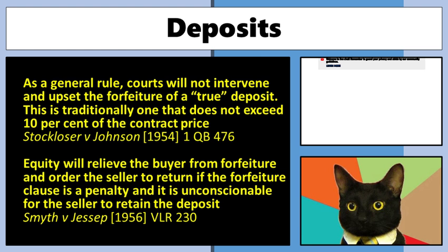And we want to go through and look at what the parties, objectively speaking, agreed to at the time. And said that, look, when I enter this contract, this needs to be done by this time, and if it's not, this amount becomes payable. If the two parties are coming to this on an even keel, this amount is something that both sides were, in theory, happy with. Where it's a problem is where there's an imbalance of power, and the courts do go through and look at that.